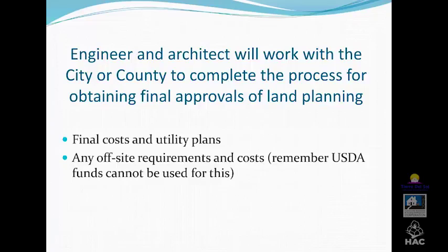Okay, I'm going to skip here just a minute because I have this budget form that likely looks familiar from the first presentation, because here we estimated that the reserve would be $30,000 per year for this project, when in fact now we are conducting the operating and the CNA, and that CNA will dictate what this number will be, and it will likely change. So this budget form that we used for the initial application is going to be revised more likely than not.